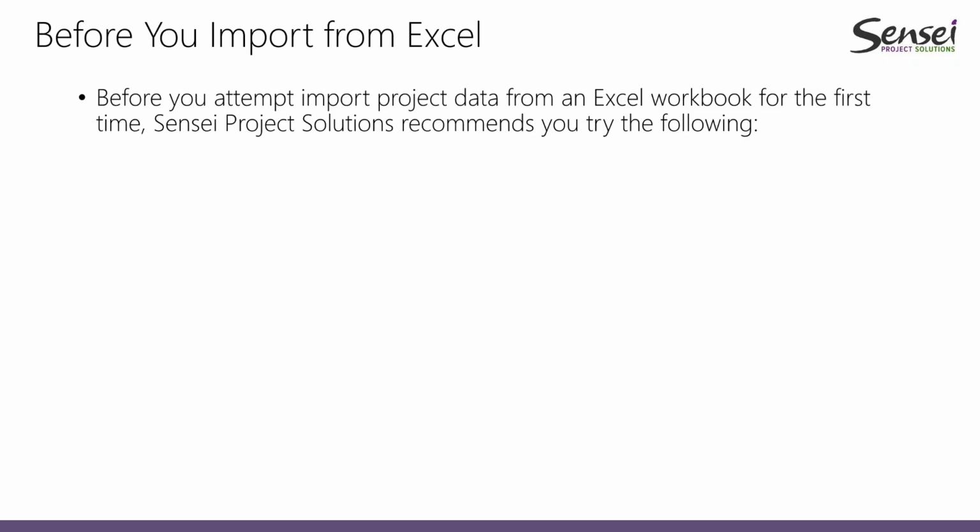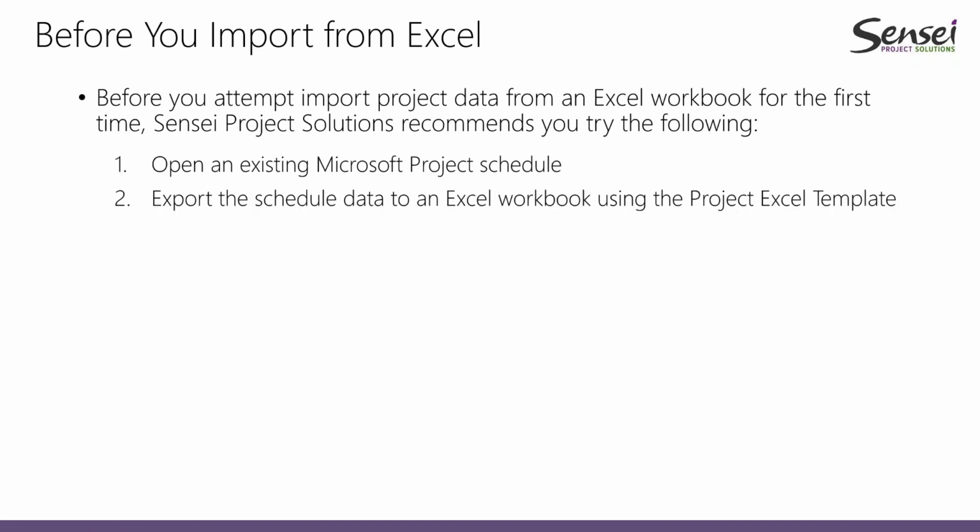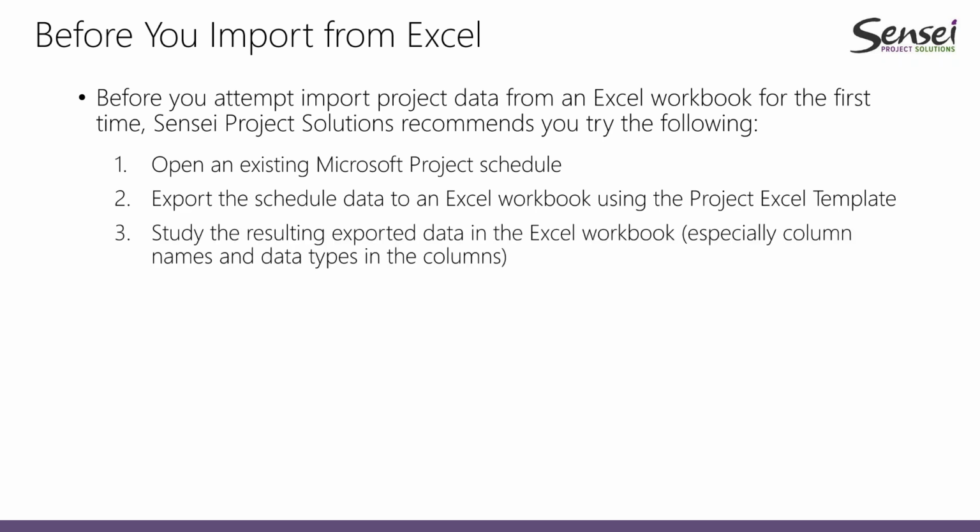Now, before you attempt to import data from Excel, there are a couple of things we recommend you do first. Number one, we recommend that you open any existing Microsoft Project schedule and then export that schedule data into an Excel workbook using what is known as the Project Excel template.